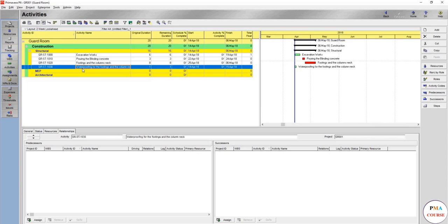You can just finish the activity list, or assume a duration now, or take it from the construction team, or use the resources and get the productivity. You can say this will take, for example, 1 day per primer coat, according to what you are going to add. So we will give it 6 days, which is too much. We can keep it 5. Anyhow, we'll keep it 6 for now, because later on we might compress the schedule, so at least we know in which activity we are going to compress. You should always keep this in mind as well.